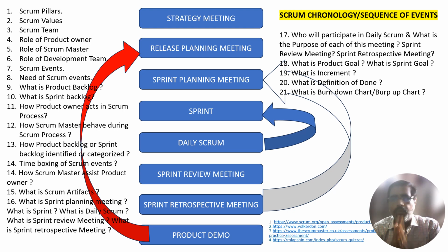The Scrum team may also invite other people to attend sprint planning to provide advice. Sprint planning addresses the following topics: why the sprint is valuable, what can be done during this sprint, and how the chosen product backlog items will get done.